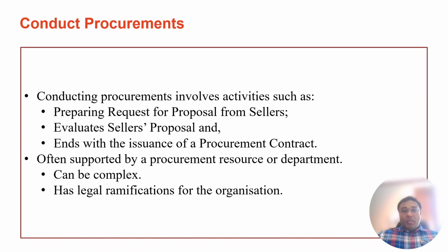You probably will also be sitting with the vendors to negotiate. It could be price, scope or schedule or any other risk. And you will identify, evaluate, analyze and select your supplier and have a contract. So the output pretty much is your selected sellers, agreement and contract, and updates to your project documents.